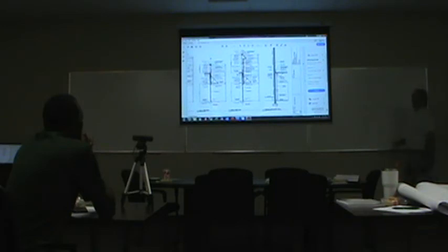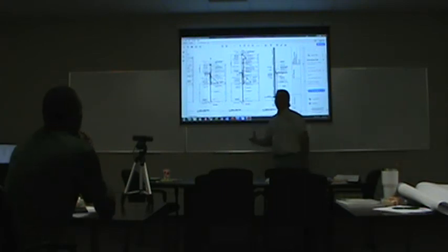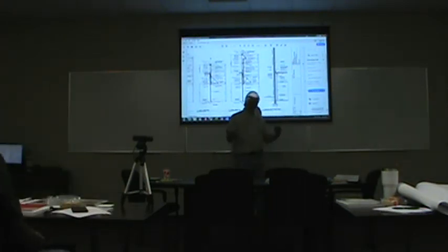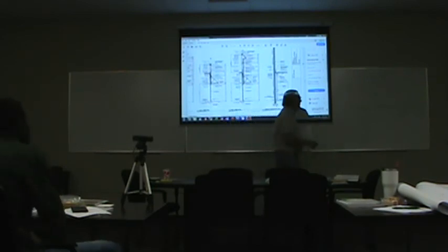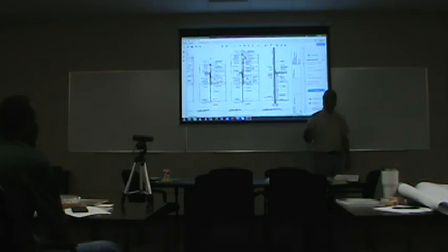Now, once you start framing that wall, what are some procurement issues or procurement items you need to be able to do the walls? Studs. Doors, door frames. Okay. You may have welded door frames that need to be built in the wall. They may not be knockdown door frames. It may be welded, so you've got to build them in the wall. So you have wall building items.